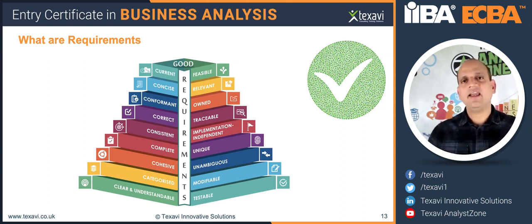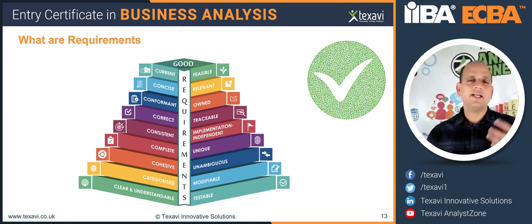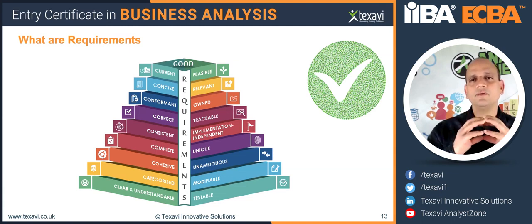It is a self-contained unit so that developers can actually refer to this and then they can develop this just on its own without having to worry about what are the other touch points and things like that. So it should be independent, negotiable, and it should be delivering value to the users and the customers and the business. It should be estimatable. It should be sizable. It should be small enough to be able to estimate and to be able to develop.